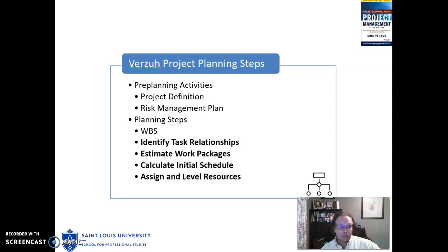In week 4, we completed the WBS. If your WBS is already task-oriented, you can move on to the next step. If not, if you have a deliverable-oriented WBS, you'll need to define activities and tasks before you can move on to Step 2.